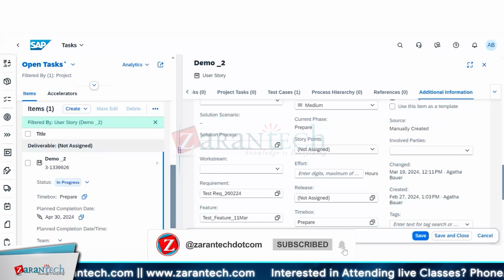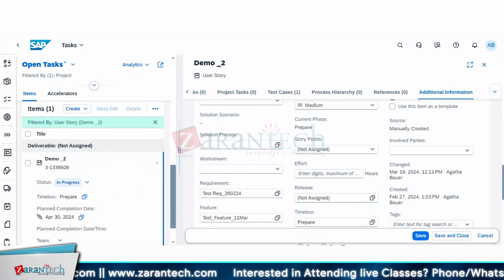Then how are you going to create your features? Are you going to create the feature once the requirement is approved? And then who is going to create it? And for a feature, how does the status work? Till production, it is with the work stream, with the SI partners, that they will do testing. They can change the status. They'll move it till production.